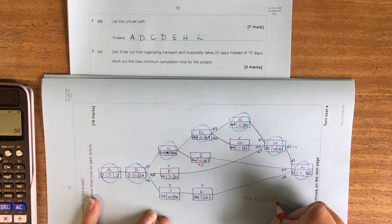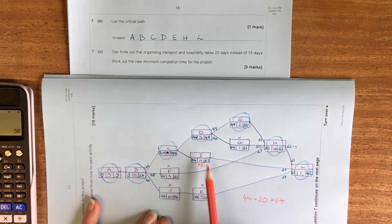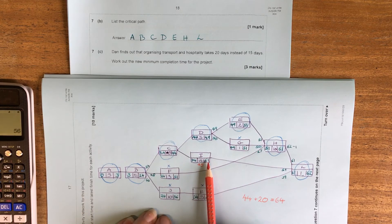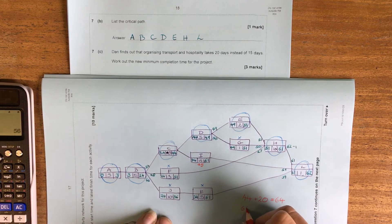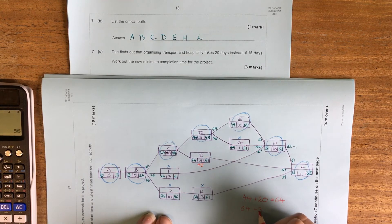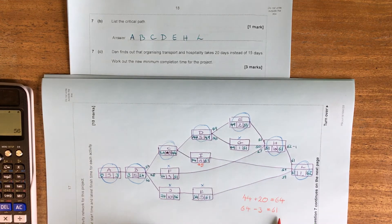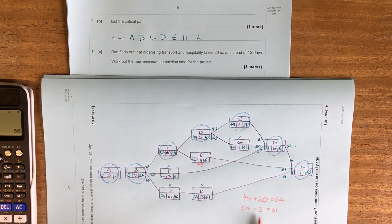Our latest deadline for that was 61. So 64 take 3 is 61. So we are going to increase our completion time by three days overall.